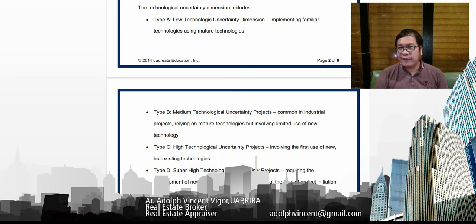Okay? So if you're going to build something that's quite novel, for example, a building that changes direction every day, then the mechanical components, for example, are not yet invented during the inception of it, and you have to work with your engineers in order to develop them. Then that's a type D, or super high technological uncertainty project. So there's a lot of risks involved.